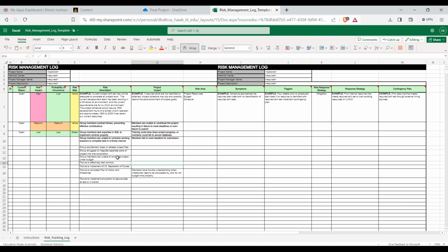Well, that's sort of like cost, right? There's time, and there's money. Well, okay, if we talked about before, like completing the project under budget, that's great for a mock one. It depends, right? There are different types of contracts, and I'll explain that in the future. Some are what they call cost plus fixed fee, which means you get a fee for every hour you work, right? So it's cost plus, and you get a fixed fee.